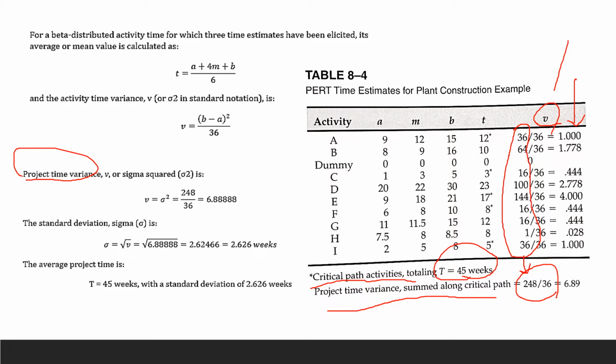Each row, each activity, you got that. Alright, so these are all your PERT time estimate calculations. Again, don't forget this is PERT, not CPM. The standard deviation is sigma, so we are taking the square root of the variance. The variance is sigma squared, so the square root of sigma squared is sigma, the standard deviation. So that's what we're doing here.